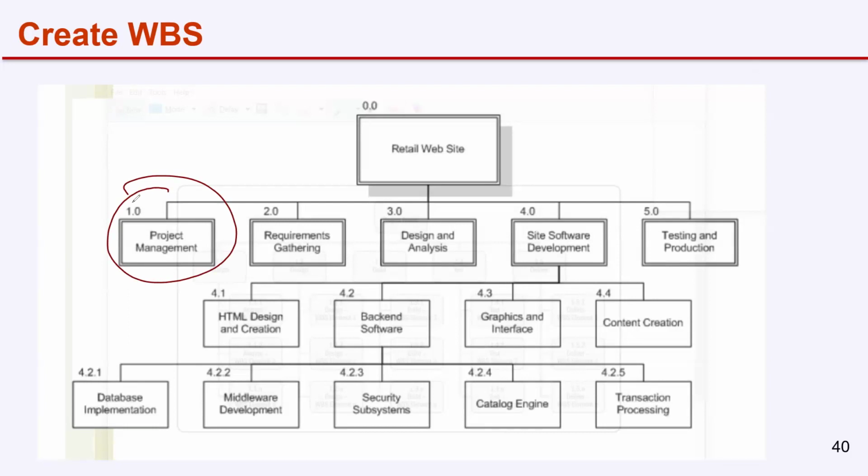So where you are going to capture your project management work? In the initiation, to develop a charter, you identify the stakeholders, so you have to conduct meetings, etc. Put that in project management. During planning, you have to develop different types of plans. You have to get permits, you have to get approvals. Put that in project management. Execution, what management work you have to do?